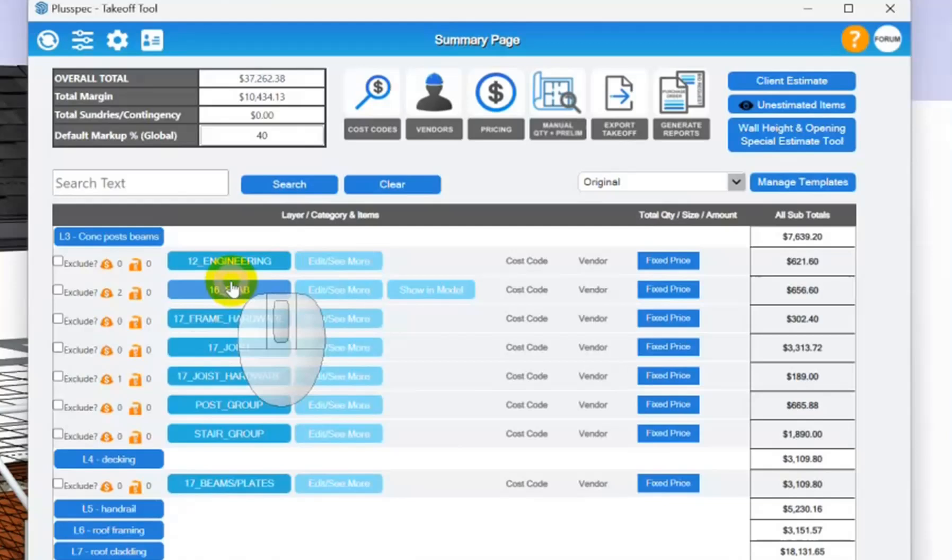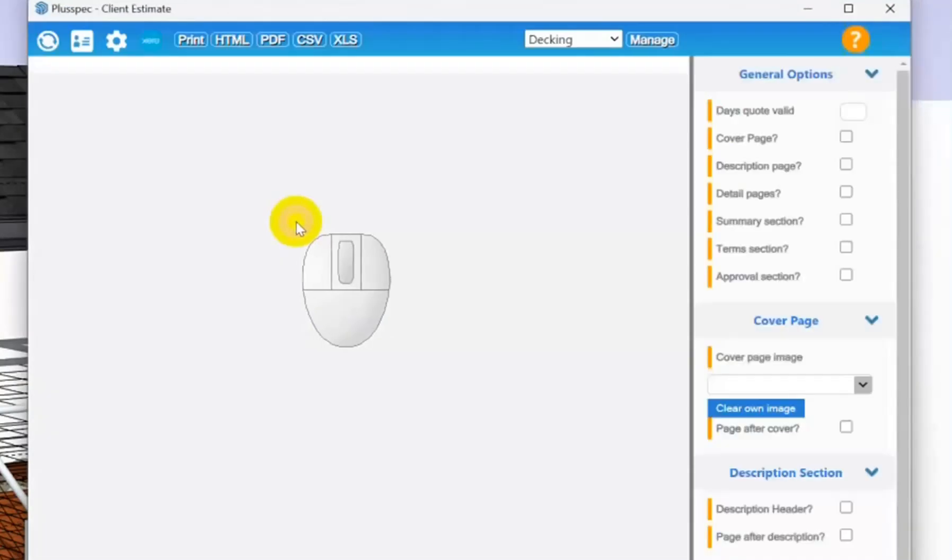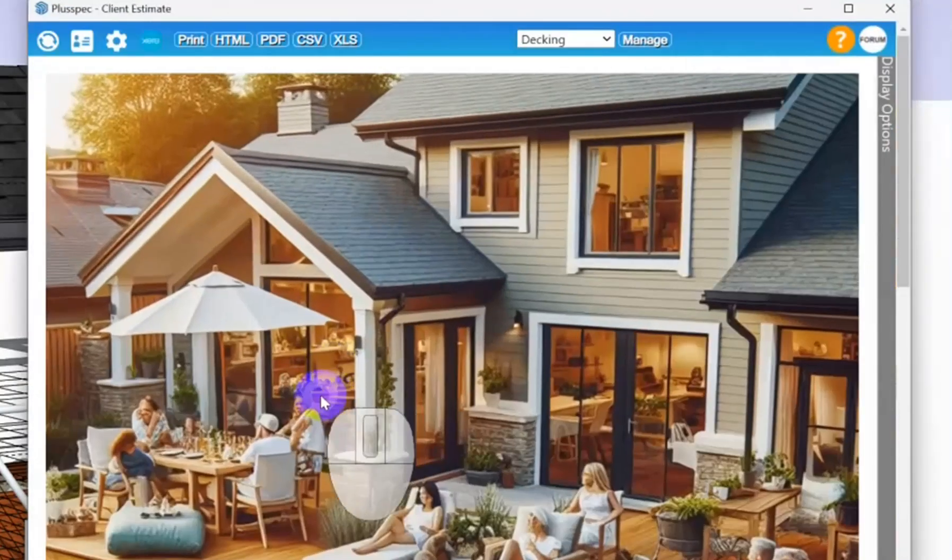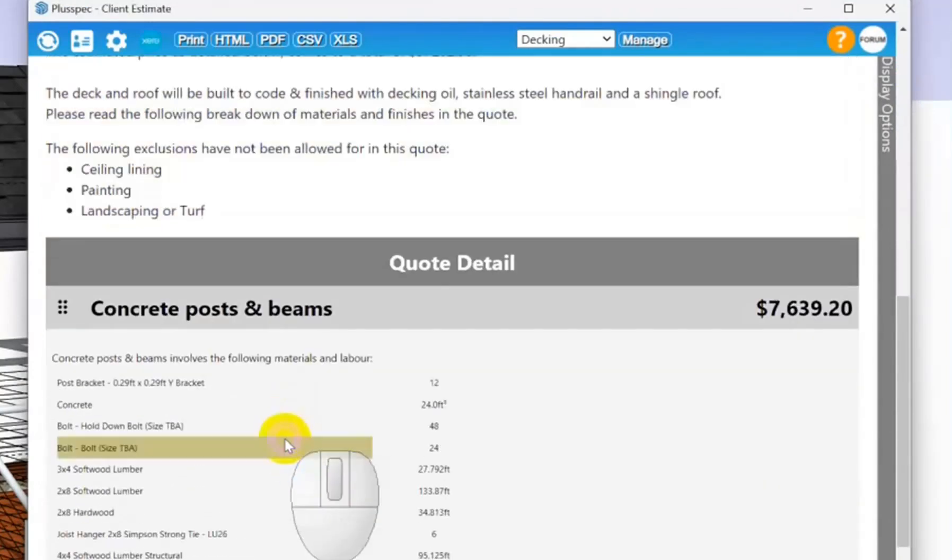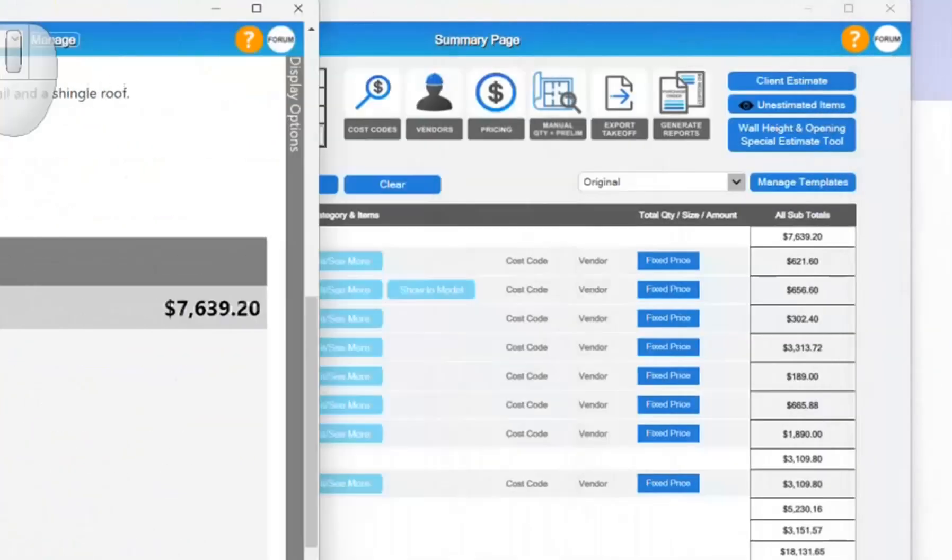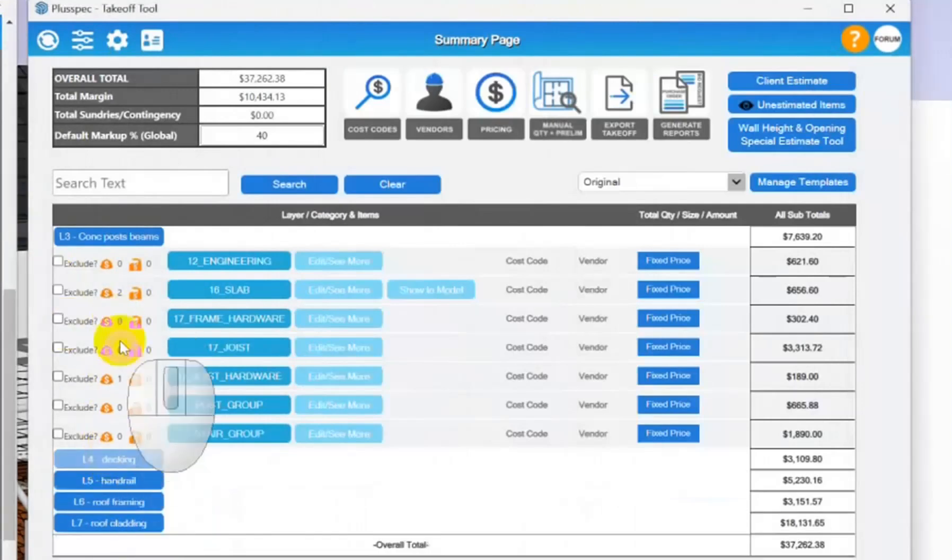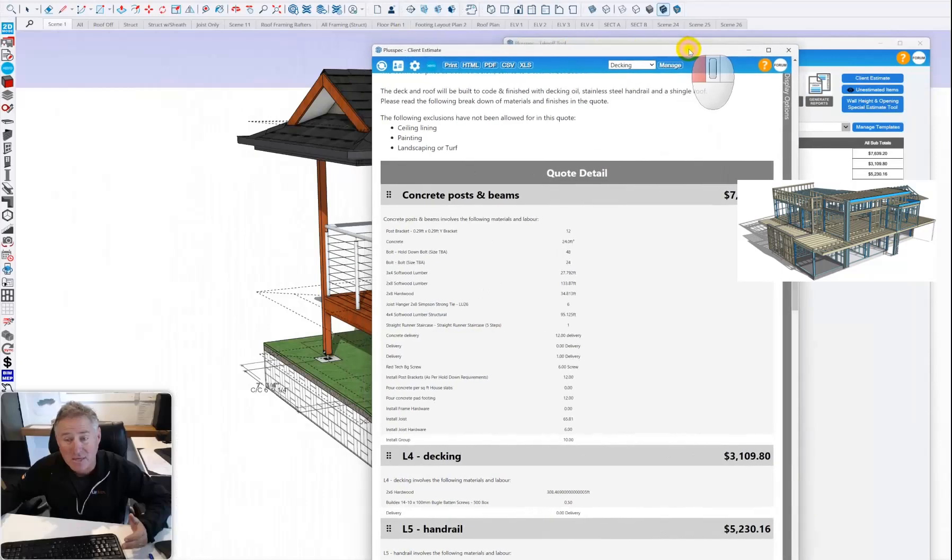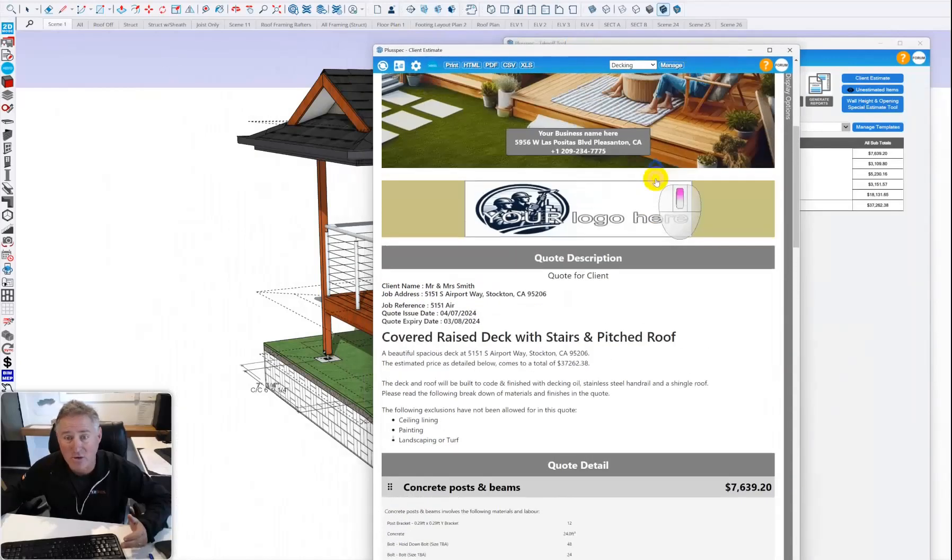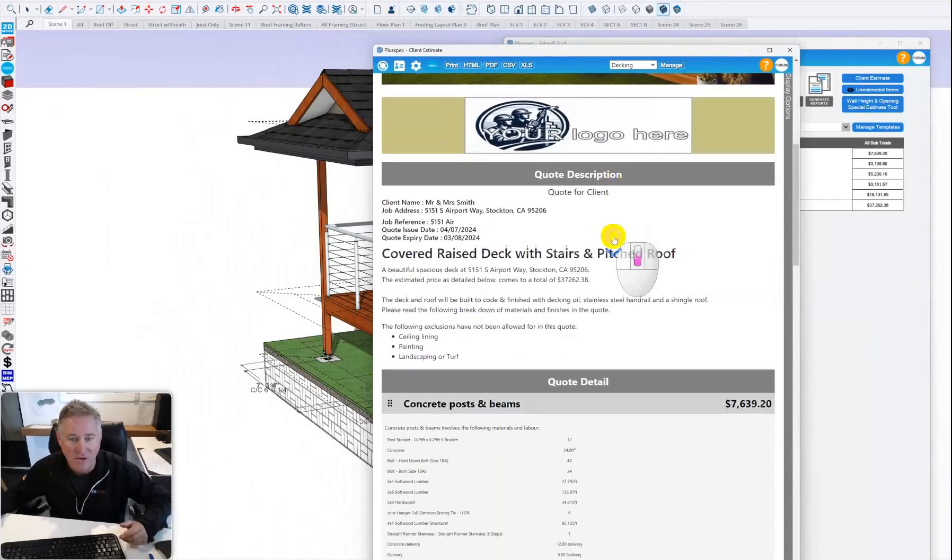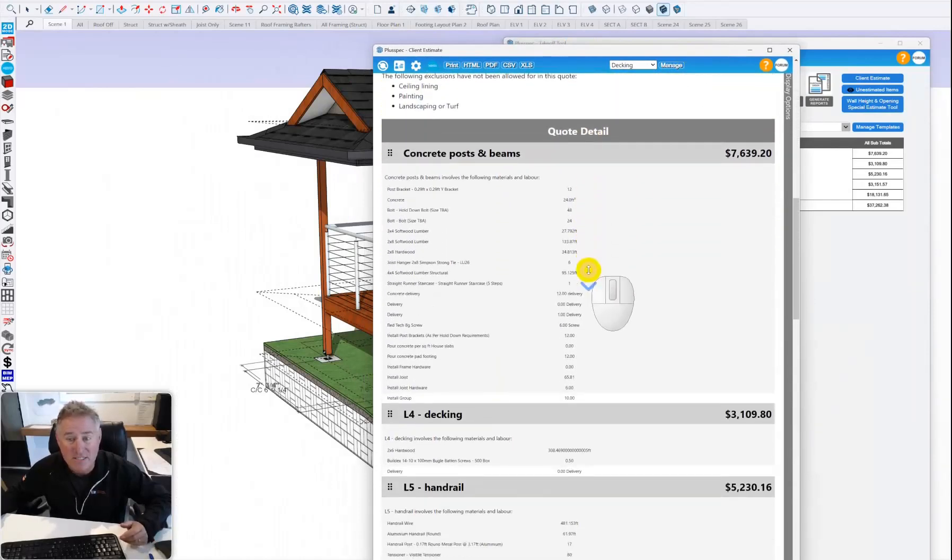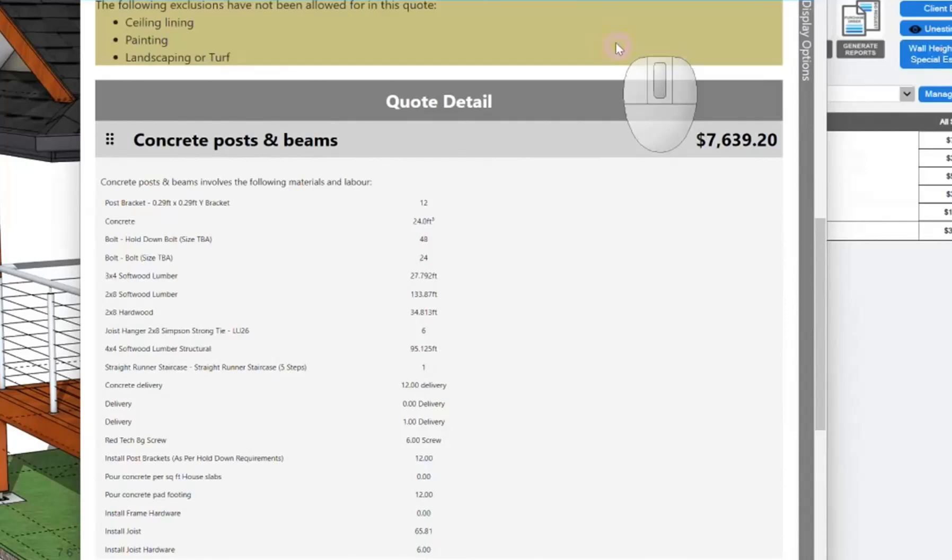There's some tools that enable us to make this better so we can get a solid bill of quantities and create a customer estimate at the same time. We can have our own pretty picture, logos, and job description all generated from the 3D model. We can also break the job down into stages. These would be progress payment stages and you can set those up with the levels and layers tool. The way you like to present your quote is up to you.